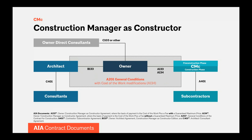The second delivery option we're discussing briefly is construction manager as constructor, or CMC for short. Susan and I presented the CMC webinar in November, posted on the AIA documents Learn site. In CMC the parties and relationships are pretty much the same as in a traditional bid project, but the difference is that the construction manager is selected early and becomes part of the project team during the design phase — which we call pre-construction. The A201 general conditions are still used once construction begins.